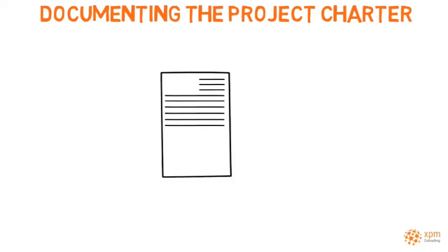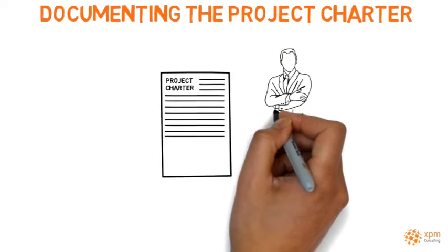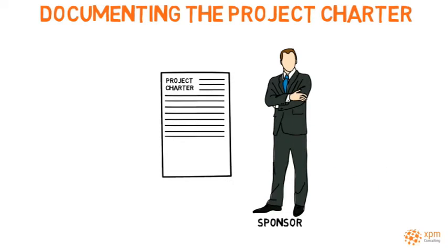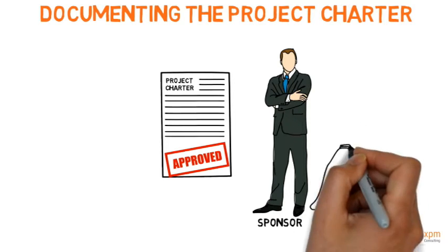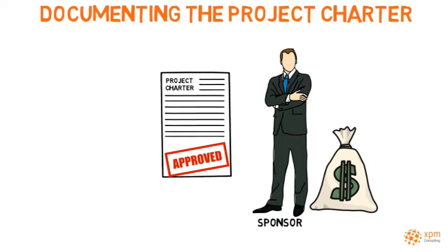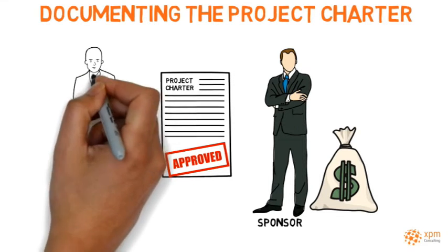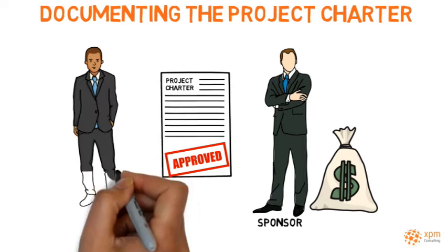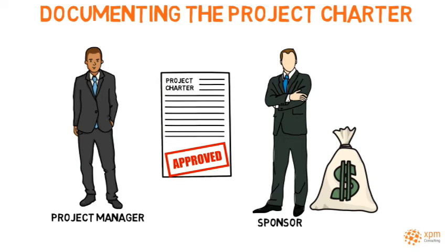The accountability for approving the project charter belongs to the sponsor, sponsors, or some form of governance board. Whoever approves the project charter should have the ability to finance the project and have enough authority for key decision-making. Even though the project is only formally authorized with an approved project charter, and the project charter is owned by a sponsor, project managers are often engaged in the development of project charters.